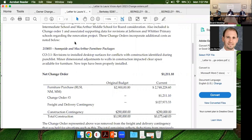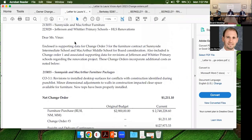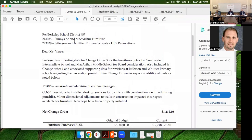One item to note with this is the lead times on light poles went up drastically with the start of summer and site work starting. So we're seeing 12 to 16 week lead time on light poles.